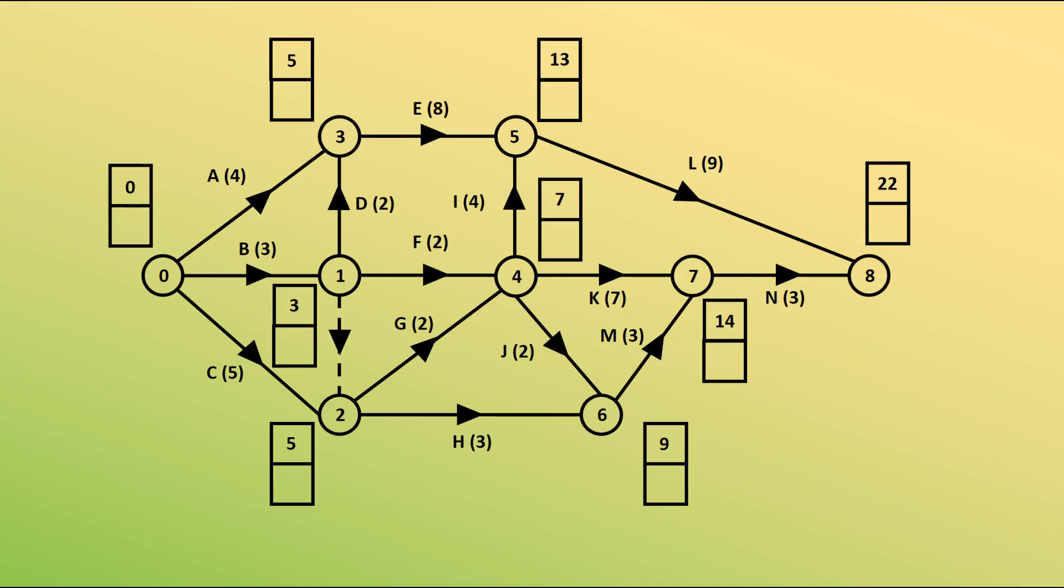We're now going to do a backwards pass, starting at node 8 and ending at node 0, to find the latest event time, which is going to go into those bottom boxes. Since we know that we can get to 8 at time 22, it makes sense to have 22 as the late event time there. We don't really want to take any longer than the minimum amount of time to complete the job. Now it's worth me saying that node 0 should always have a 0 in that bottom box as well, but don't write it in at this stage. Use the method of going back through with this backwards pass, and hopefully you should end up with a 0 at that point, so it's a good way of checking your working.